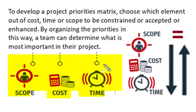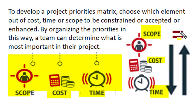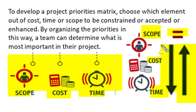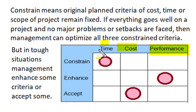The project manager and team must either meet or exceed stakeholder expectations in terms of cost, time and scope. In varying conditions and as per opportunities, the project manager can constrain, enhance or accept any of these three criteria to attain maximum benefit. When criteria are constrained, the original planned specified value — whether budget cost, scheduled time or performance scope — remains fixed. If everything goes well without major setbacks, the project can be executed as per the optimum initial design.